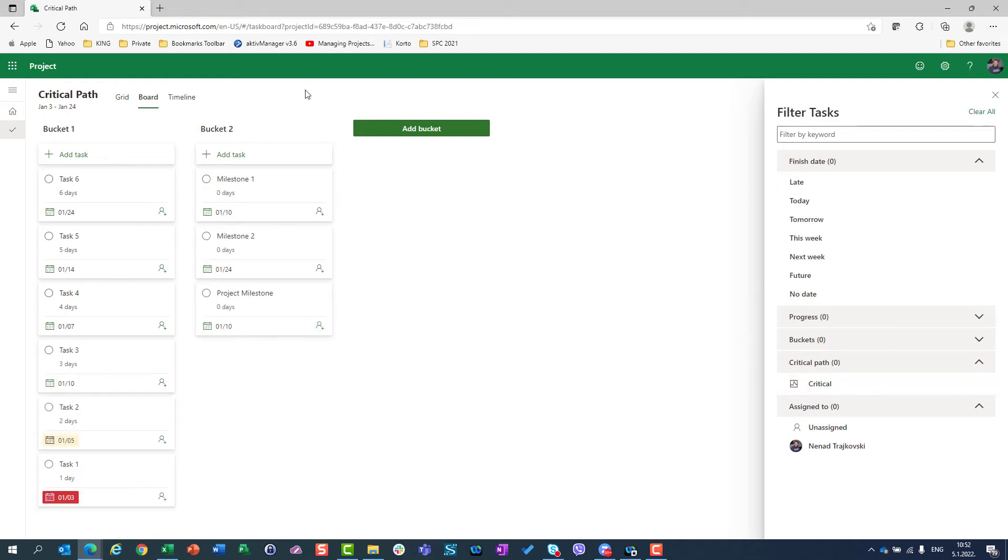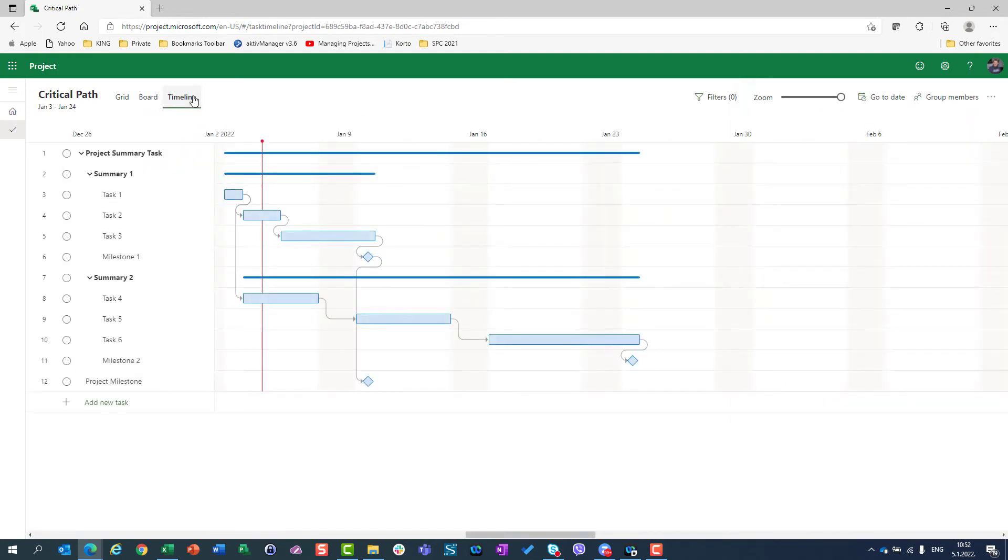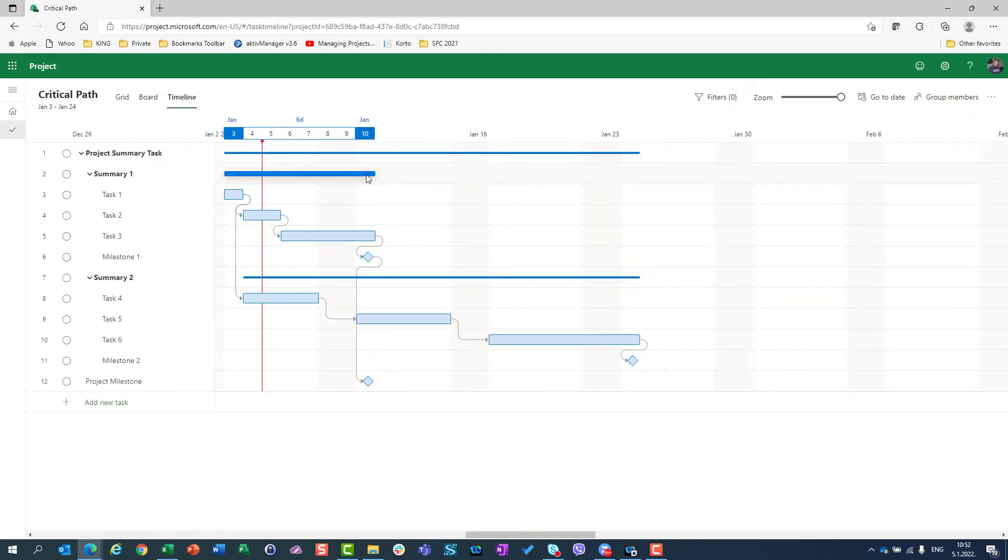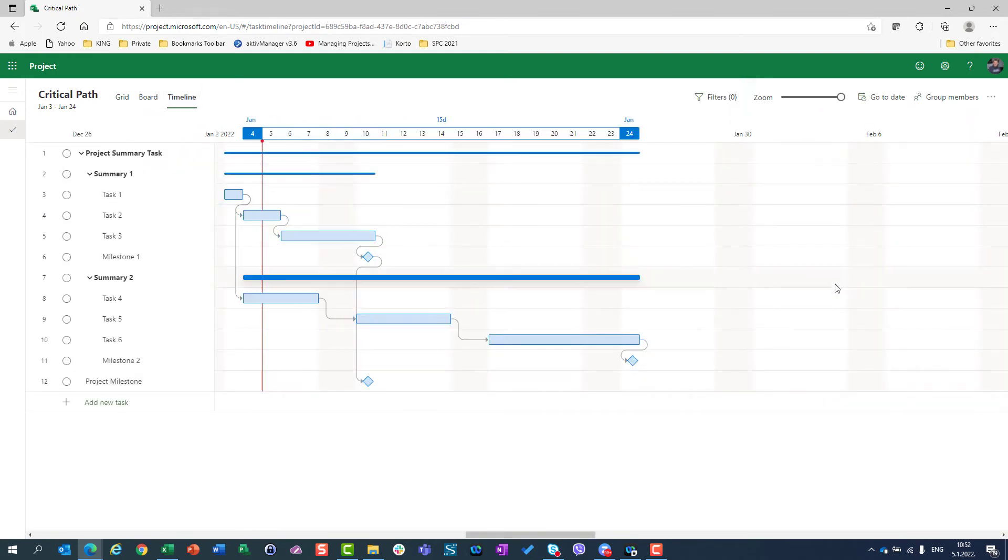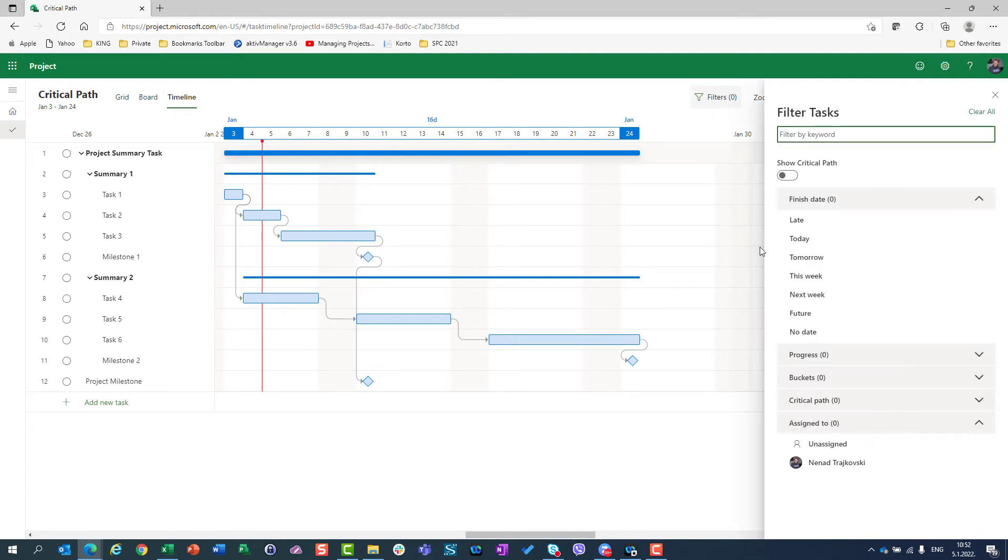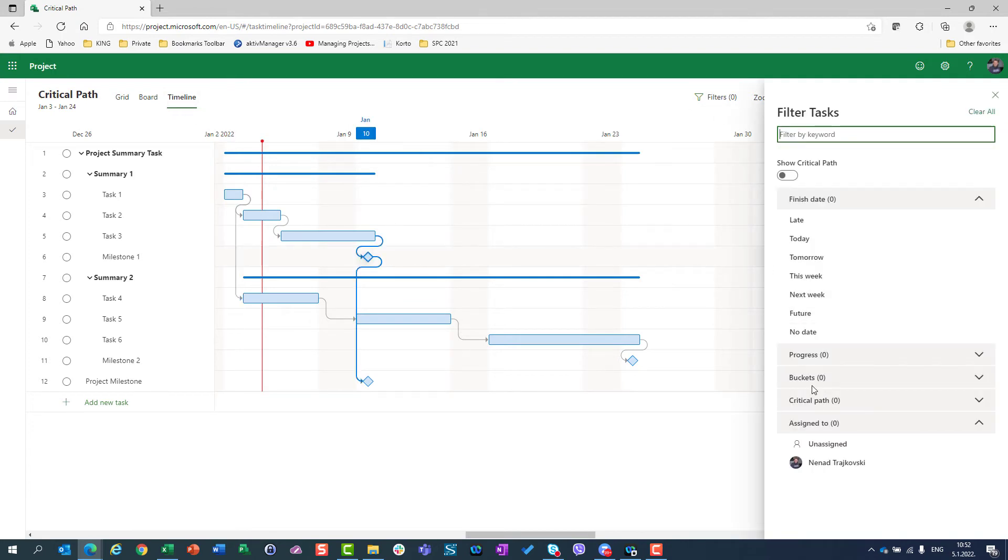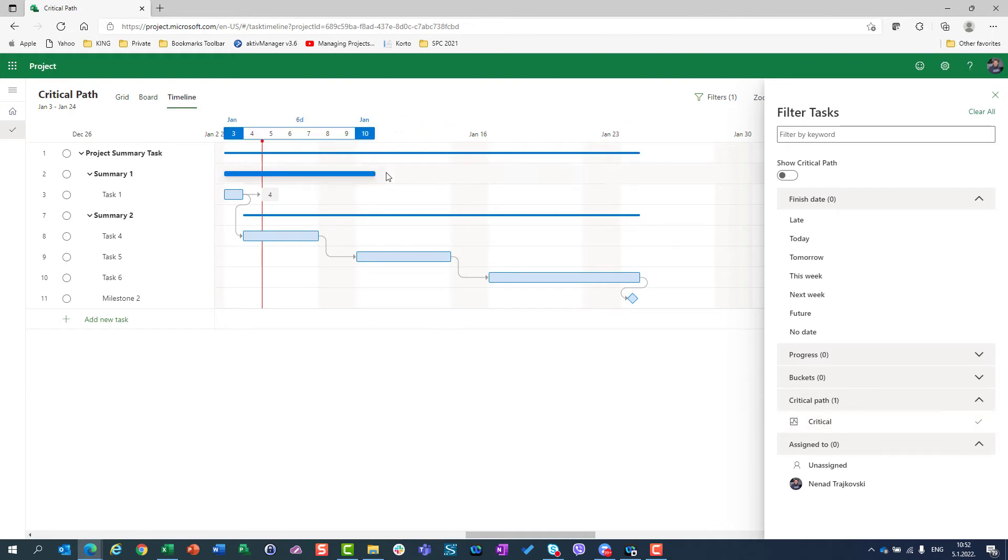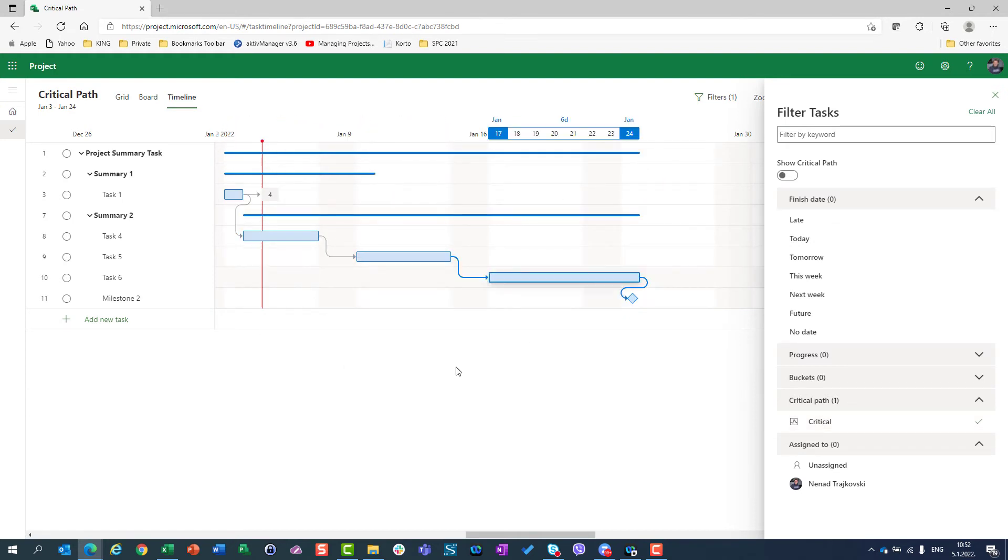Now the thing which I like most is here. I can do two things here, and those two things can be done only in Timeline. So, filter once again, Critical Path, Critical Path, and I will see only tasks on Critical Path.